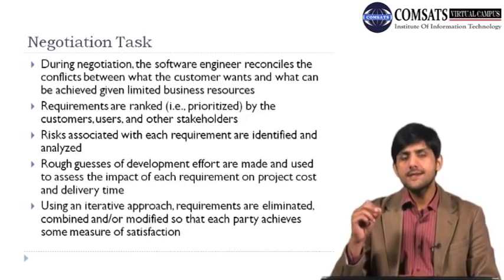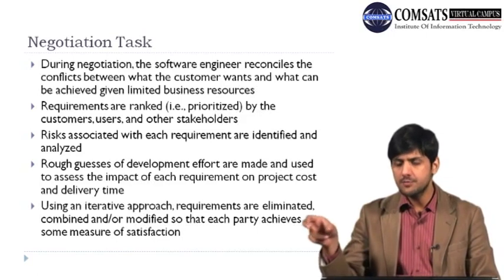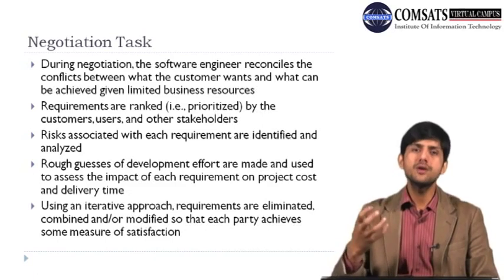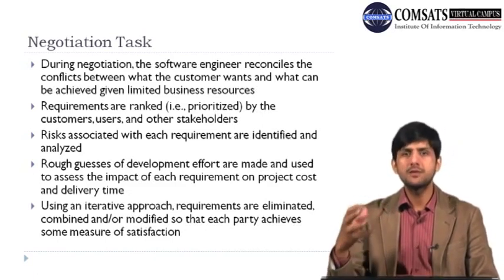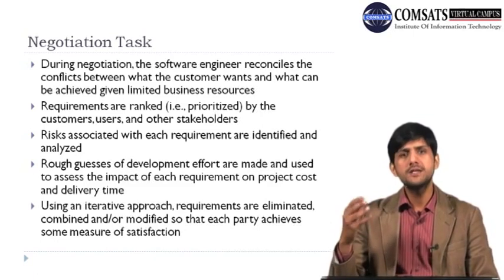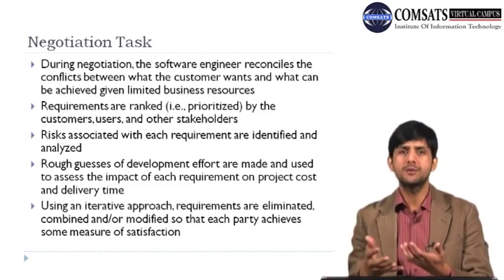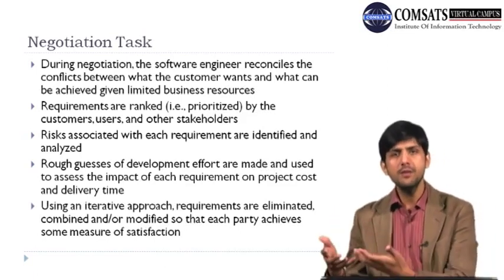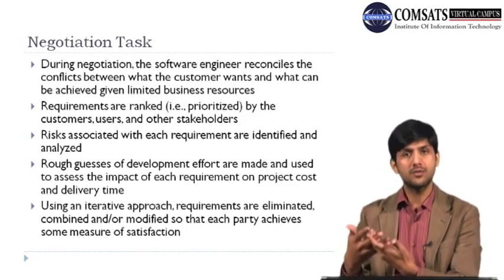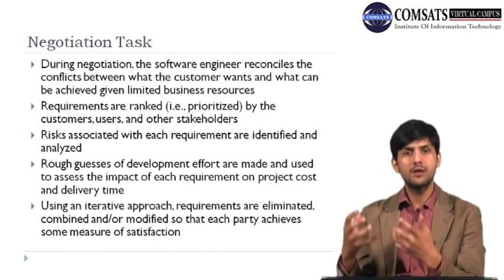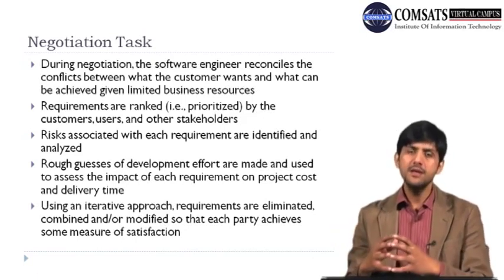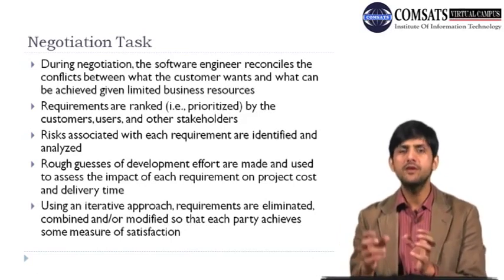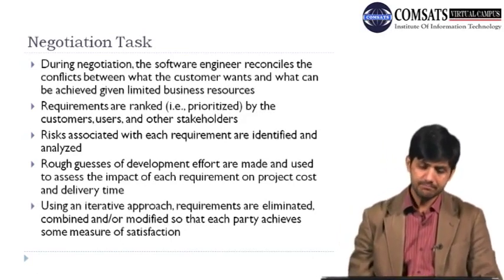Another aspect of ranking requirements is that, for example, you have multiple domain experts in your company, and each one of them has their own objectives. For example, one of them wants to minimize cost, the other one wants to maximize quality, and the third one wants to achieve all the functionalities in the minimum amount of time. So these 3 different people might have 3 different prioritizations of requirements according to what they think would give the highest quality, what might reduce the cost, and what might reduce the time. So basically you need a mechanism to rank requirements when different people have different opinions about prioritization of requirements.